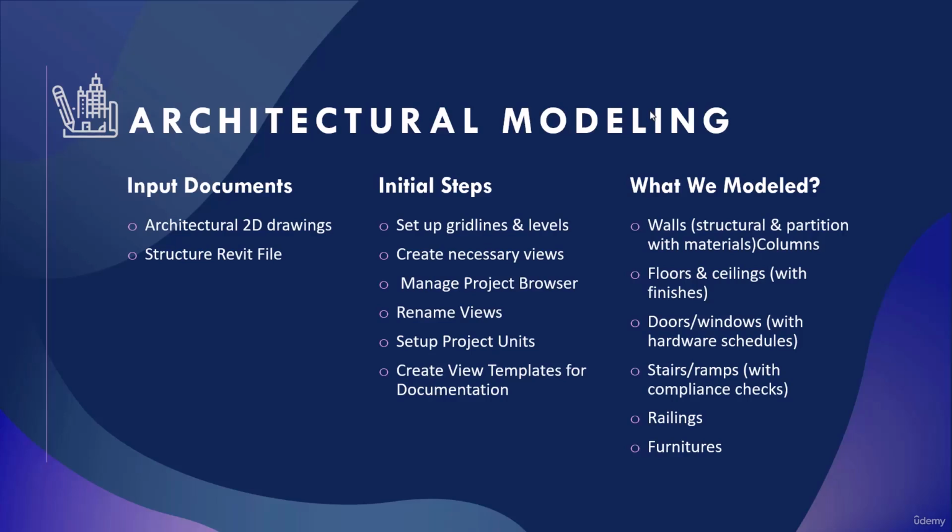See, for example, as a project manager, what do I do? Usually when you guys are modeling, I simultaneously produce the sheets and put views in them, raw views, views that have not been drawn at all. I put them in the sheets, set a scale, make a template for it, and come back to the next sheet. I repeat the same thing and make the sheets. This means that when the modeling of you guys is finished, it is not like, well, let's make the sheets now, put the views on the sheets, and put in extra time for this.